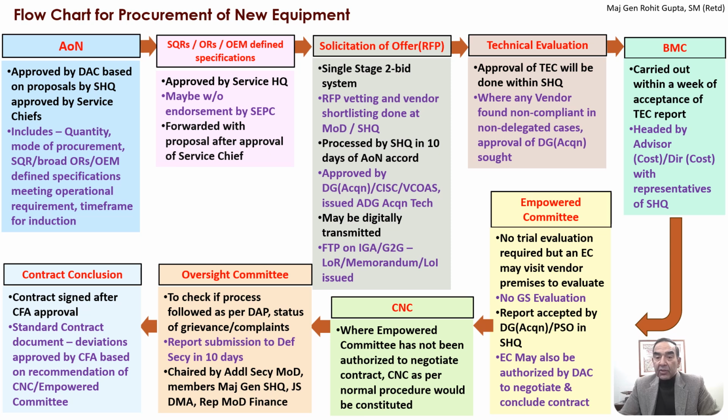Technical evaluation, the approval of the TEC will be done within the service headquarters. However, wherever a vendor is found non-compliant, even in non-delegated cases, approval of the ADG acquisition is sought. The benchmark committee is carried out within a week of acceptance of the TEC report.